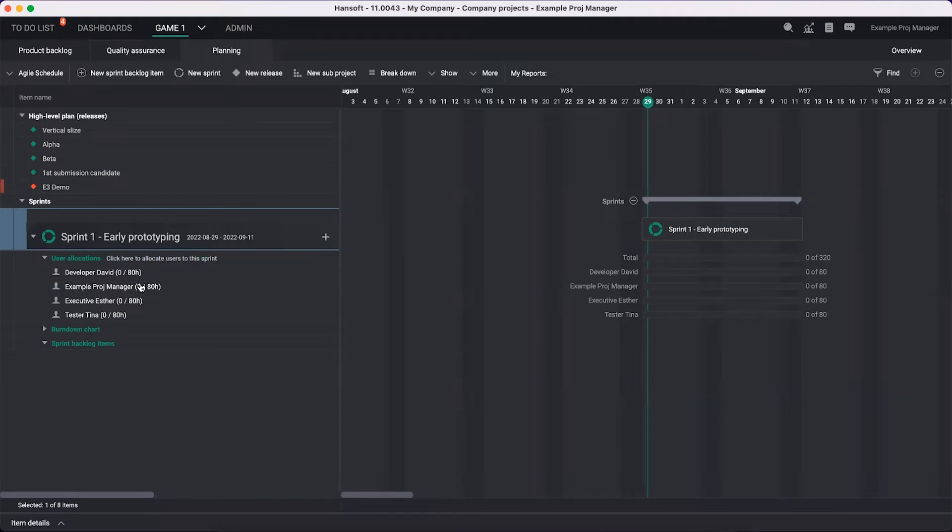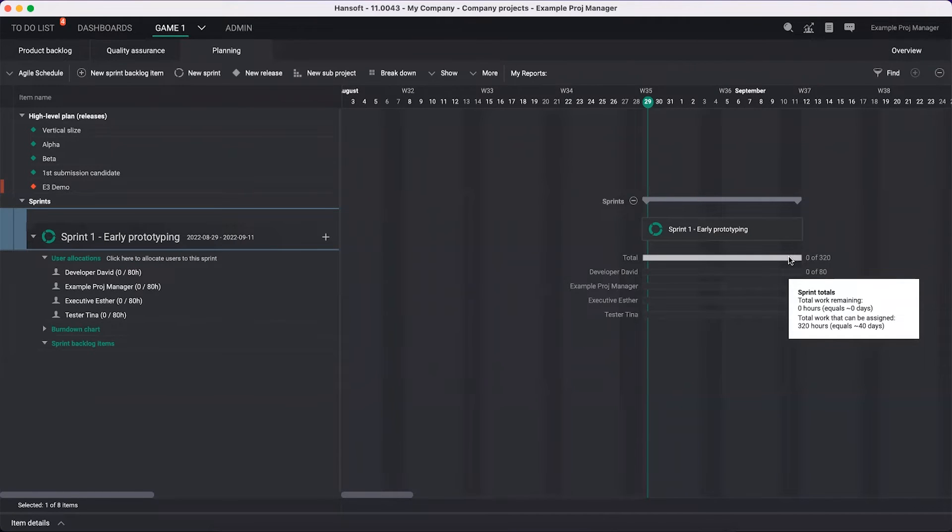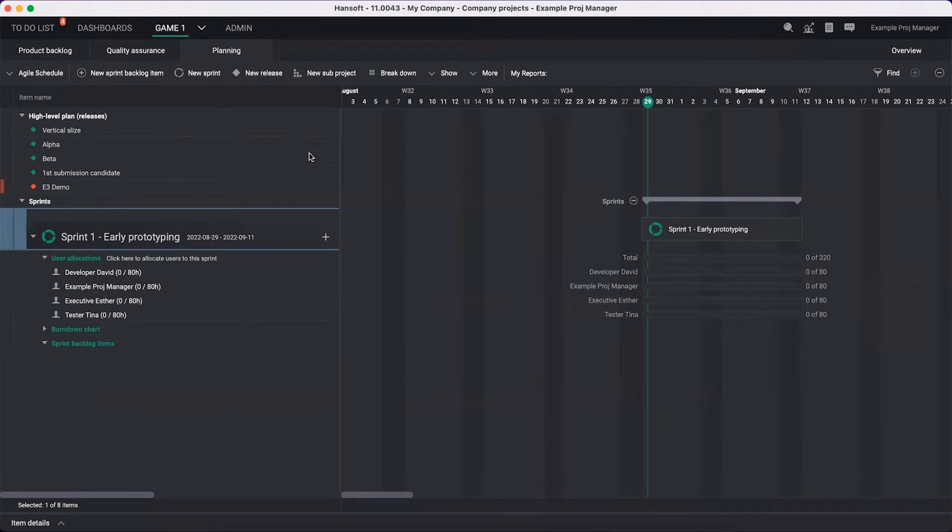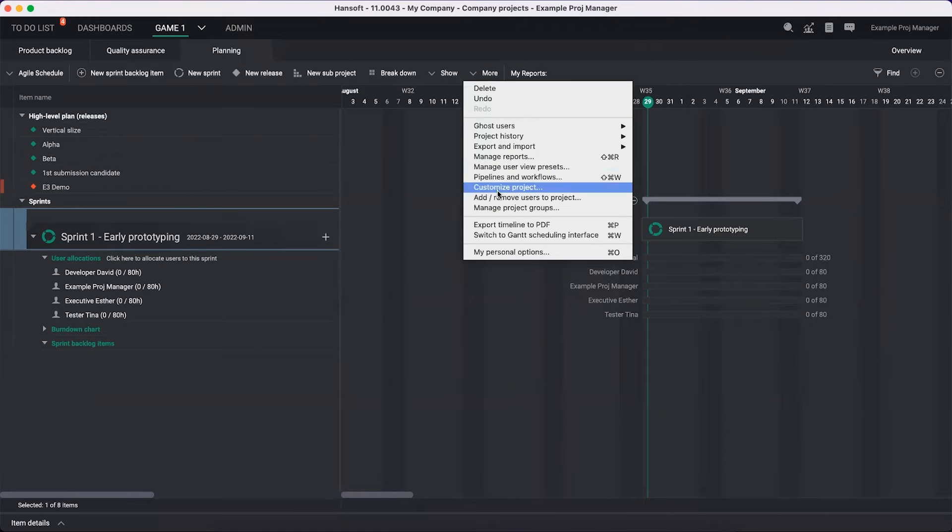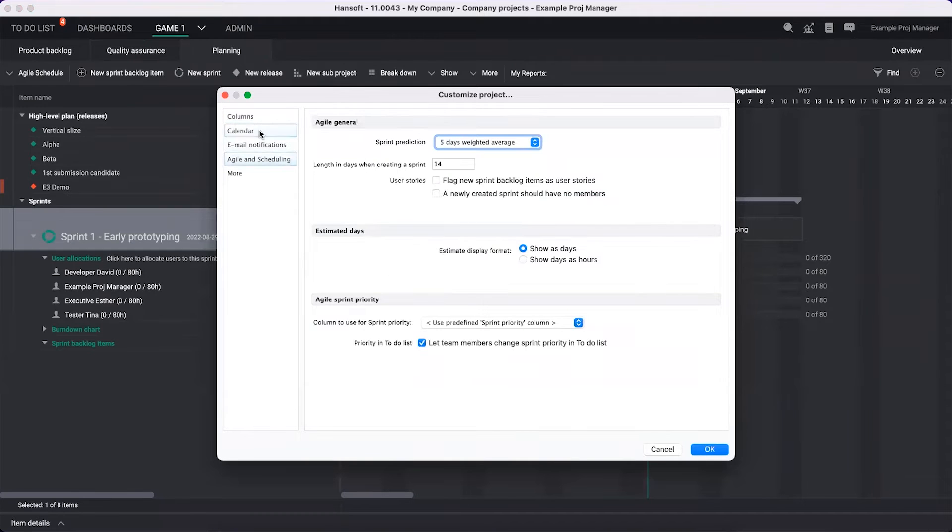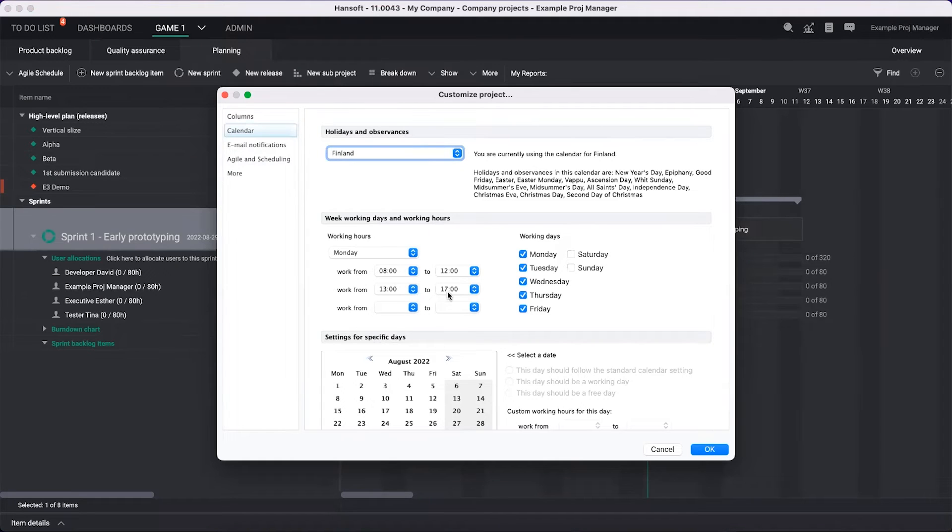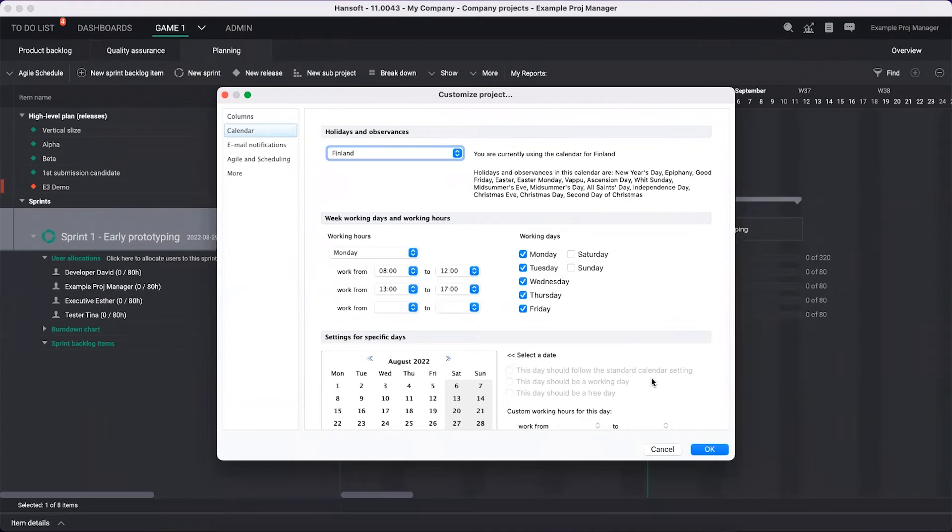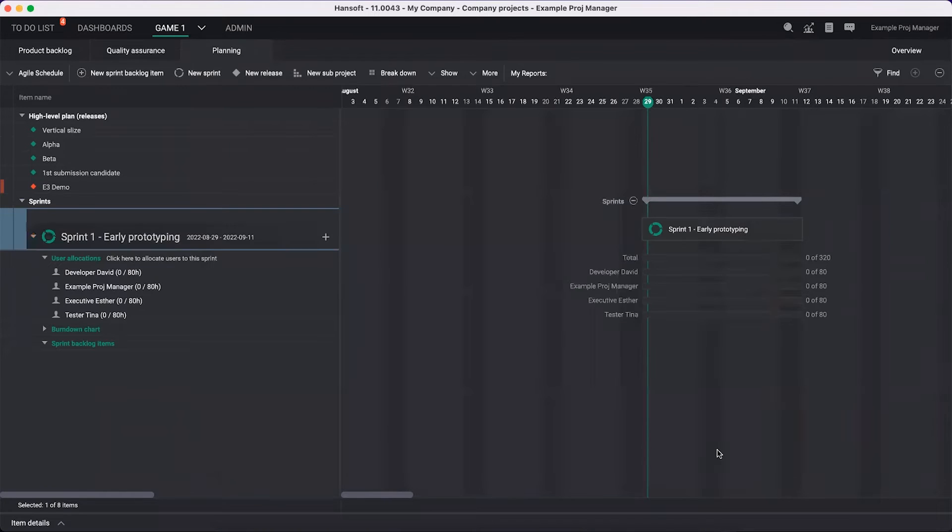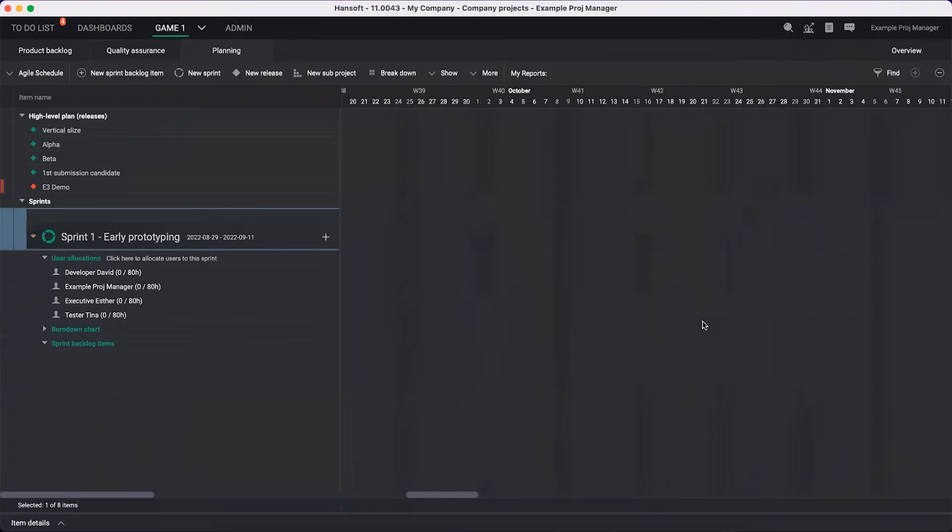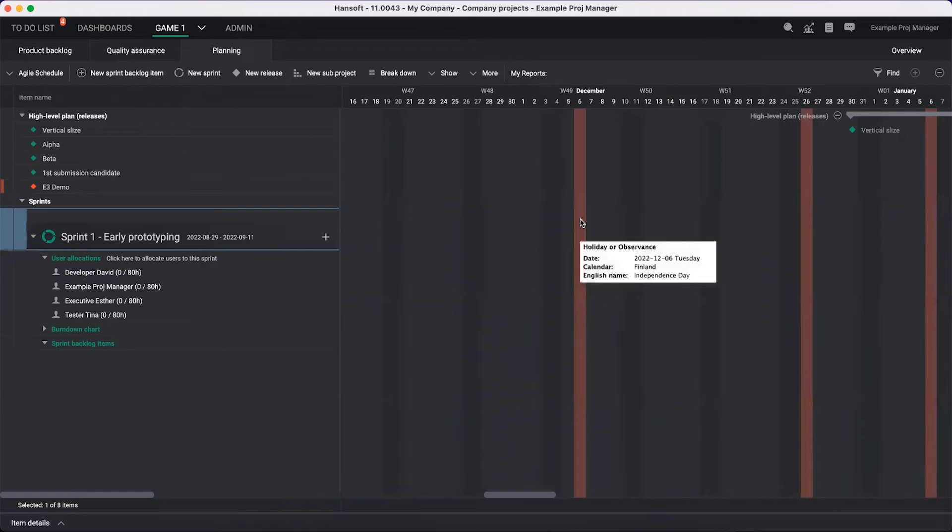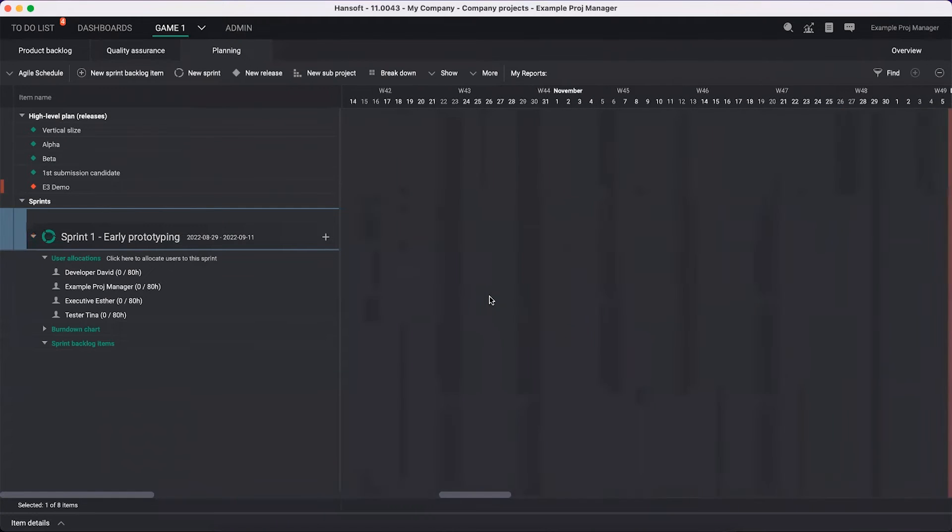I'm fine with having the four people here, but what I want to do is make sure that we don't work 80 hours or schedule 80 hours in the next two weeks. People will work that amount of time, but we don't want to schedule people 100% of their time because there are always reasons and that will cause troubles - unexpected work that's coming. So two things you want to do: first one is to go to more, customize project, and calendar. Then you want to set the place we're in. I have set this project - everyone is in Finland. You can also reduce the working hours if you want to here. In this case, we see that there are no holidays impacting this sprint. If there would be a holiday, let's see when the next one is - here's the next holiday on Independence Day on December 6th.